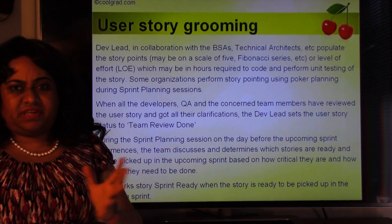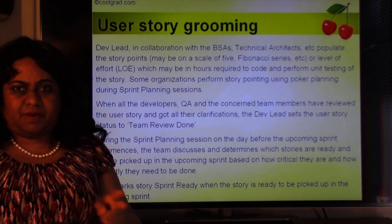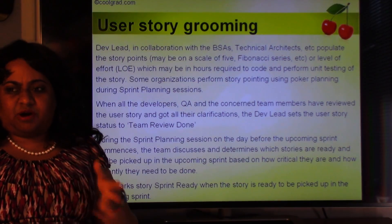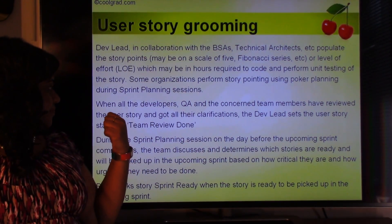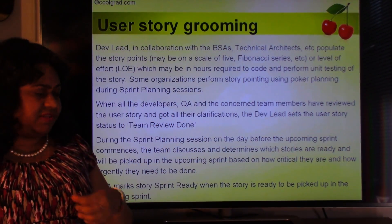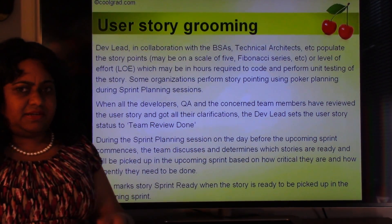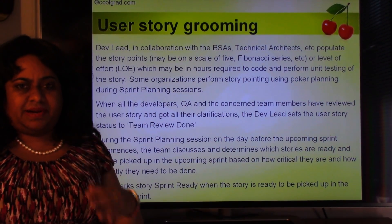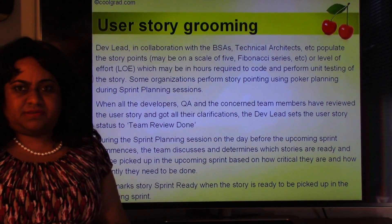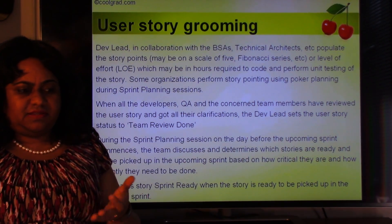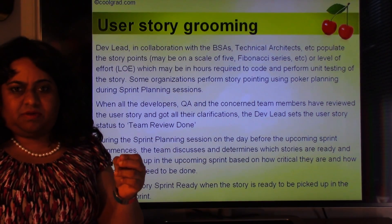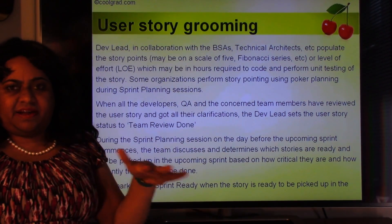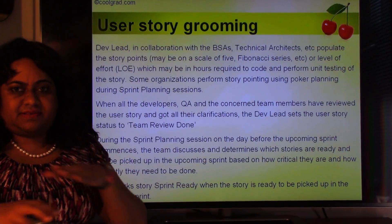Sometimes they directly put in hours — this might take 2 hours, 5 hours, 10 hours, or 30 hours, including development and testing. When all developers, QA, and concerned team members have reviewed the story and got their clarifications, the dev lead sets the user story status to 'team review done.' If they have doubts — like not understanding a particular object or specification — they get them clarified, arrive at a consensus, and the dev lead or BSA marks it as team review done.